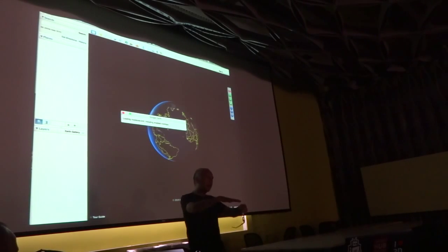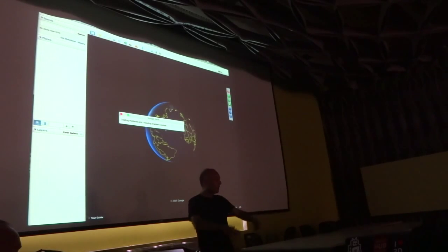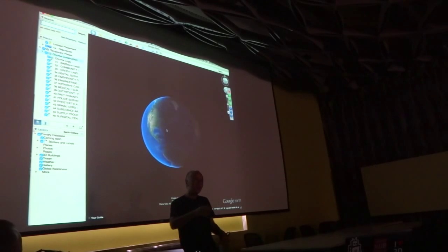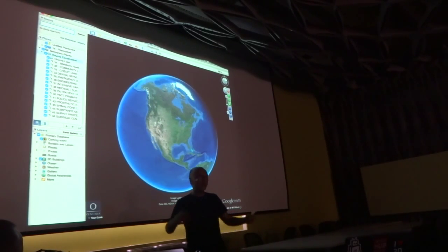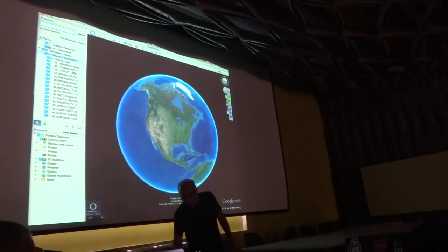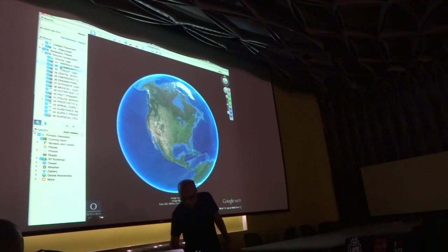We're basically stacking all these spaces. We're counting equipment, and Val Forbeti put a cost to that equipment. We can then extrapolate from that and pull it out into the whole building. It's obviously a first shot, but at least you throw something out there and you get a reaction. These kinds of projects typically drag on for months, if not years, and all of a sudden you have cost overruns, which is a huge problem with these massive complex projects. But this applies even to simple projects. As soon as you can start seeing things like this, you can start to make decisions with it.